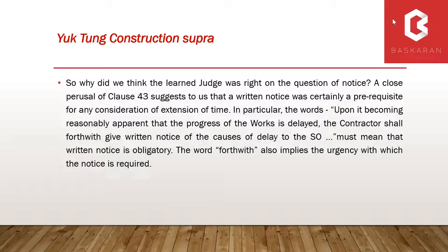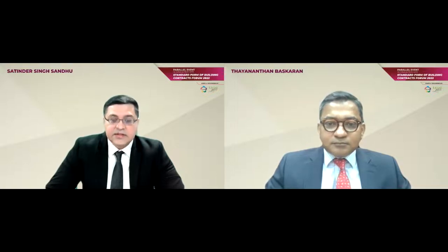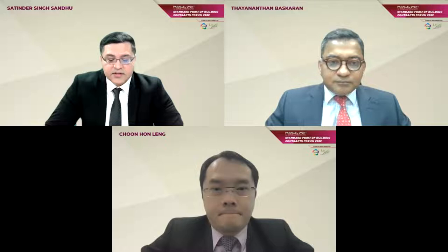Just to add on to what Tayan said: another interesting point on extension of time in the new PAM 2018 is Clause 23.4, where architects are now required to provide reasons for rejecting the contractor's EOT submissions. When the architect issues a certificate of extension of time, he needs to provide details within six weeks from receipt of sufficient particulars from the contractor. This is a good change as it avoids ambiguity and arguments about why the architect rejects the contractor's applications, and likewise if he grants extension of time, he needs to provide necessary details.